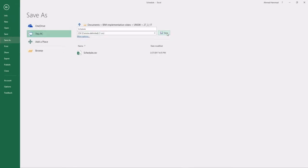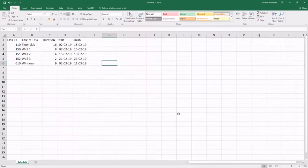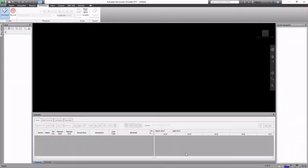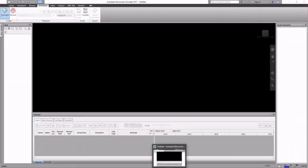Save your schedule as a CSV so that we can import it into Navisworks. Make sure you've got a Task ID column. That's very important. That basically forms your link to your Revit model.